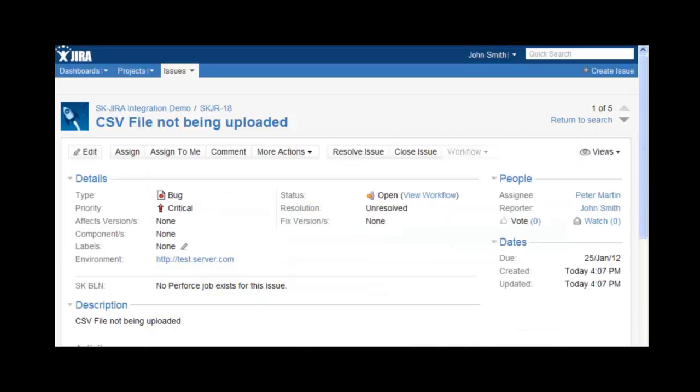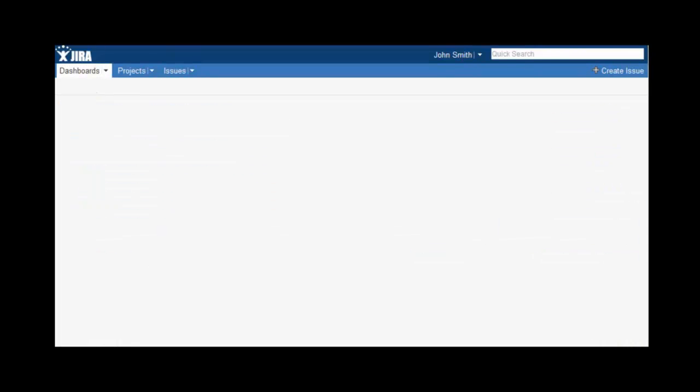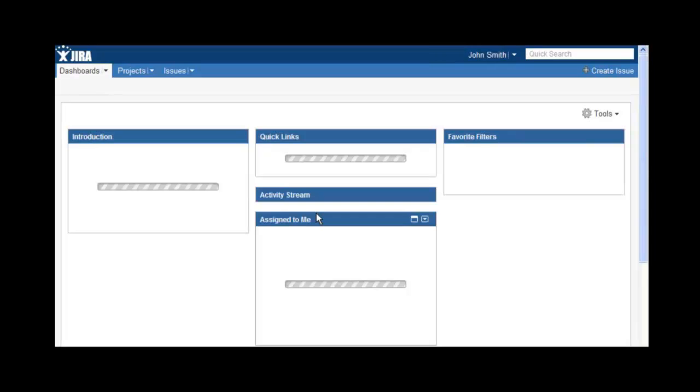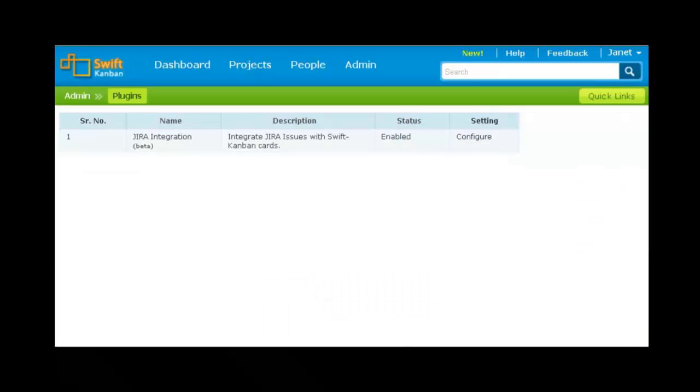There can be more such defects logged in the project. So, we can create a filter that puts all such defects from this particular project and save it as a new filter and call it customer defects.